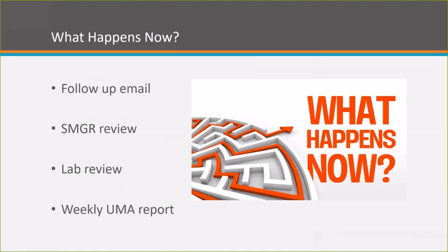If there's something missing, if there's an issue, it's going to be identified in that email that's been sent to you. It will direct you to the item that's causing an issue. So for example, if you only create a sample record that has the Universal Materials Submission template and the producer-supplier submission, but you don't have an acceptance method, it's going to identify that you're missing an acceptance method.